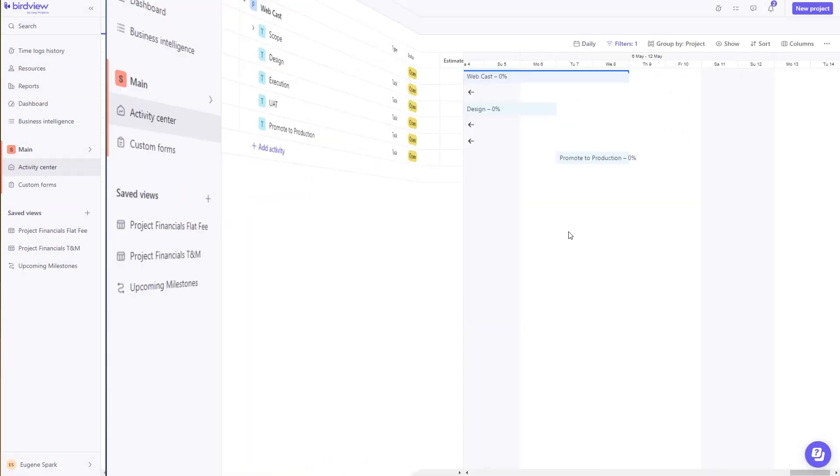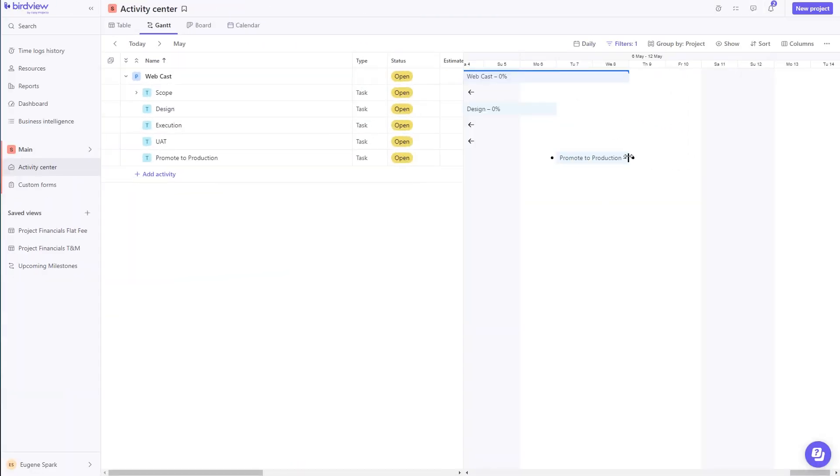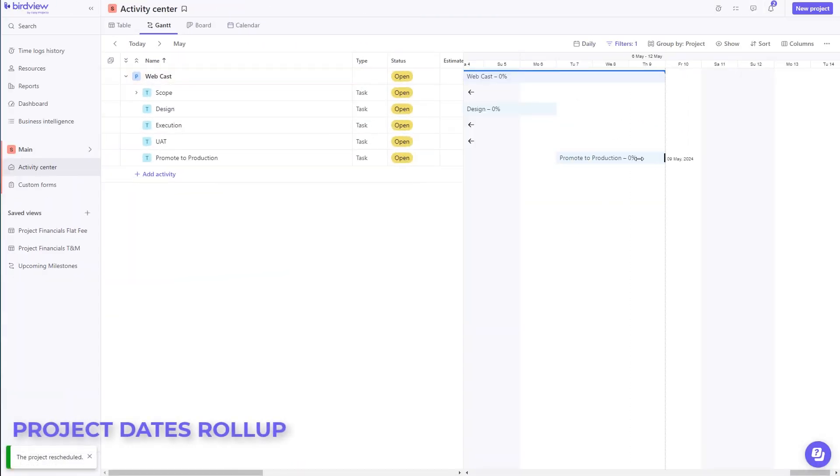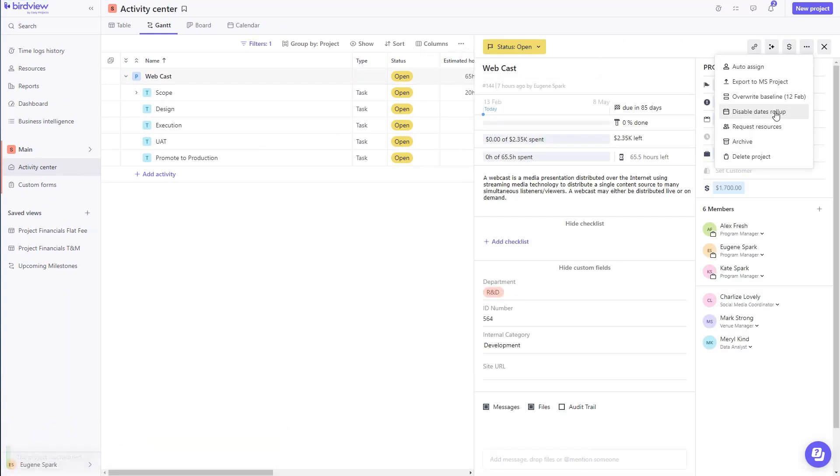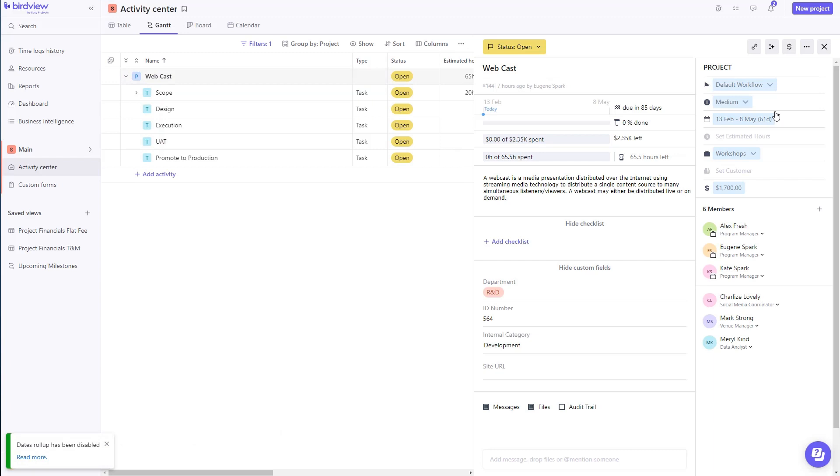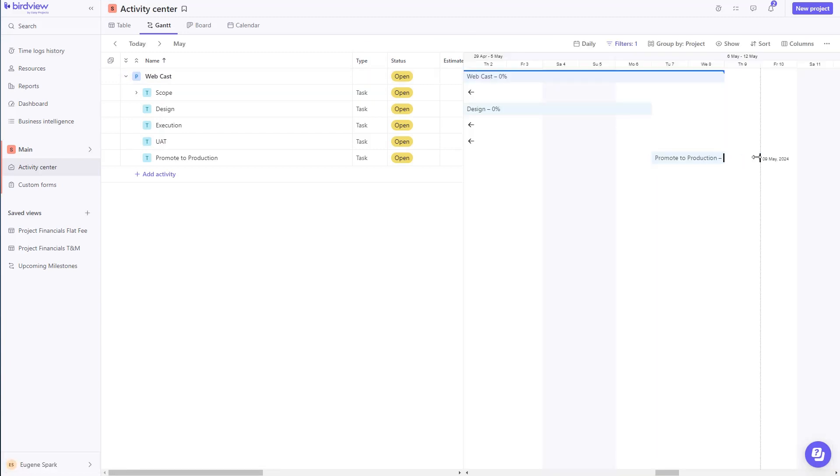Need to control dates, and not have dates roll up from subtasks to top-level tasks? Use the disable date roll-up feature, and you can control the dates at each level.